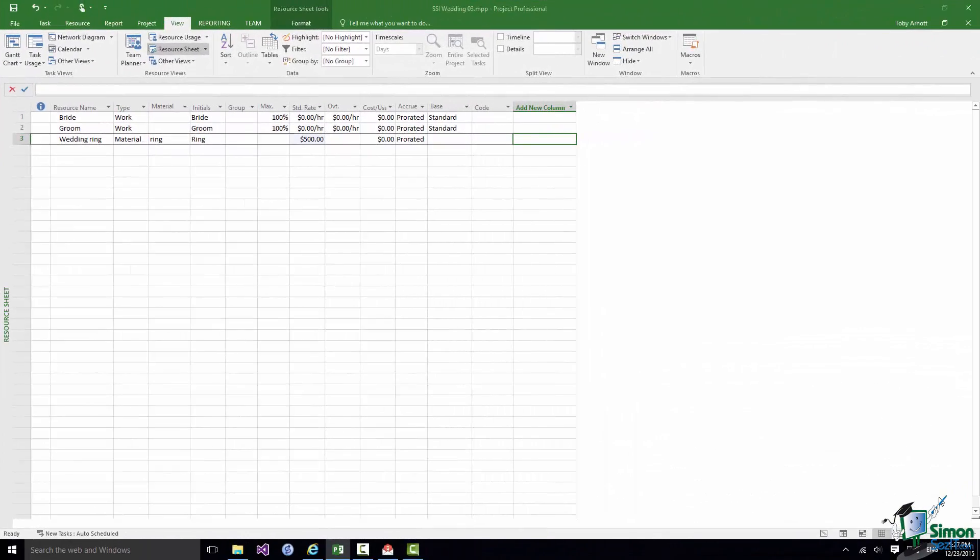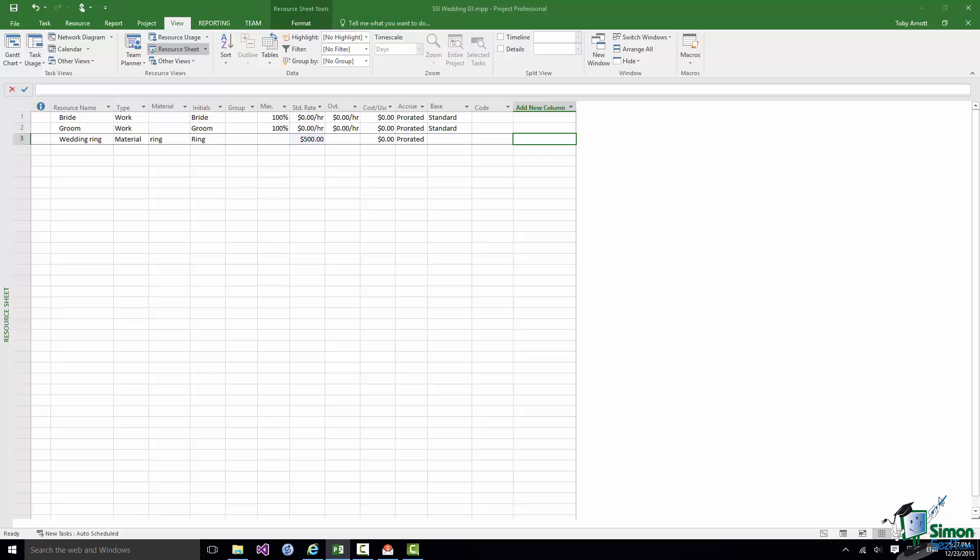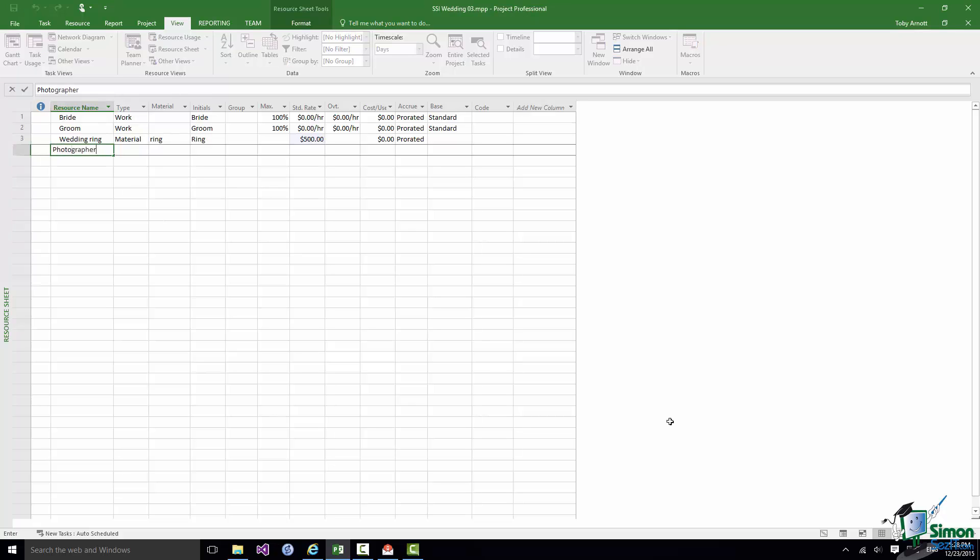Now for an example of a cost resource and it's going to seem as though I'm disagreeing with what I said earlier in this section. Sometimes a person working on a project is not really working on it as though they were say a builder or in this case the bride or groom, somebody who's directly involved in a number of tasks on the project. What they are doing is more of a service. So I might choose to make the photographer or videographer for this project a service, a cost to the project. We're not talking about paying this person by the hour. We're talking about their standard charge for photographing or videoing a wedding. So in this case I'm going to add a resource photographer and not deal with the photographer as though he or she is a person working on the project but deal with them as a service to the project, a cost to the project. So on this occasion I'm going to make the type cost.